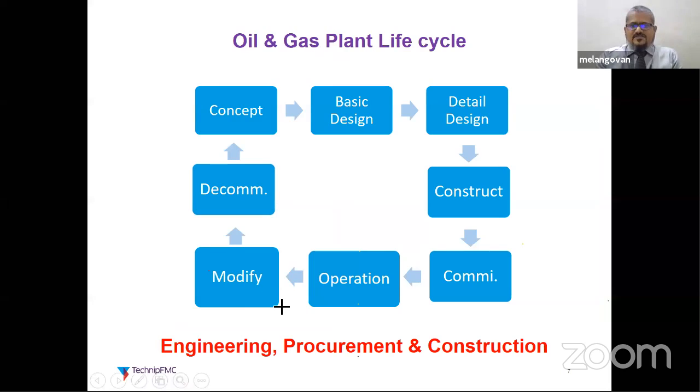Here, I have given the typical life cycle of an oil and gas project. Generally, we'll start with the concept. I have one product in mind, so I want to develop a plant to produce a product. That is the concept stage. The concept is what I'm going to do. I need to fix the capacity of my plant, the very basic things, what area of land I require, and what the key equipment is.